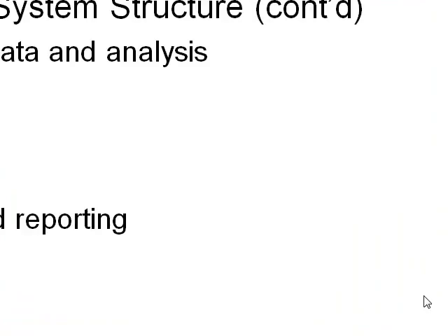Finally, we move to the reports and the reporting. Who's going to actually receive the report? It's important because different reports are needed for different levels. Senior management might want to know, are we on time and are we within budget? And if not, what are we doing about it? But the project manager might want to know where the deliverables and the work packages are at and if they're being handled correctly. So we got to know who's going to receive the reports. Also, how will they be transmitted and when will they be distributed? So who, how, and when.